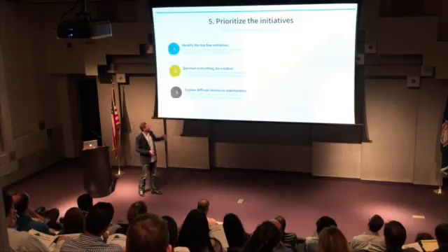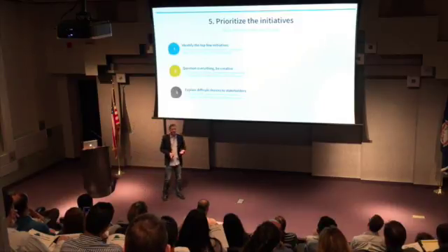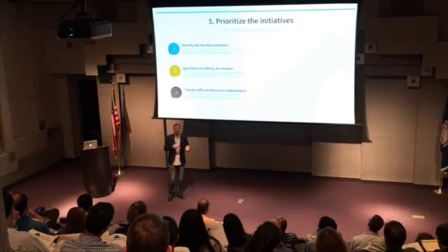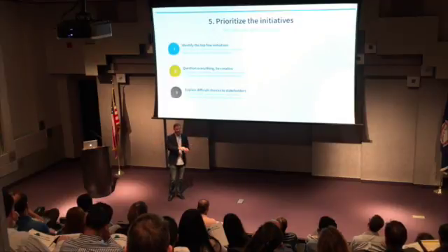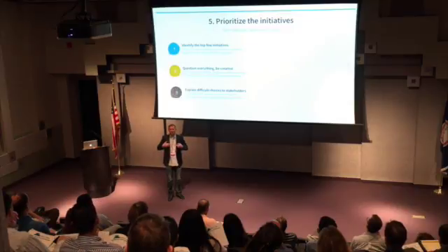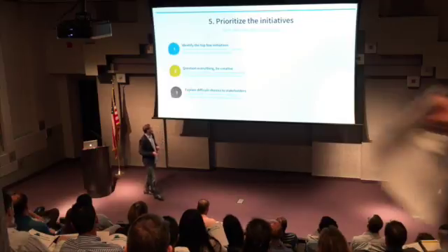So it's worth questioning everything and being creative, but also pushing back on its constraints. Maybe the budget is a constraint that should be pushed back upon because people don't realize what the implications are for the business of having that constraint. The whole reason that we have this constraint here is to try to make the bottom line look a lot better over here. But if we actually added $30,000 budget here, then we would afford ourselves the ability to go build something else that makes $1 million in incremental sales. Well, hey guys, that's pretty well worth it. But you don't know that that's the situation until you go through something like this.